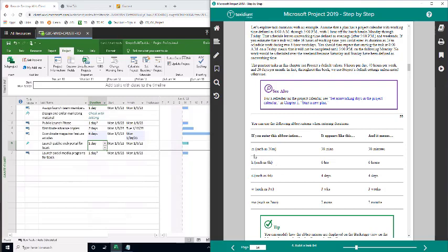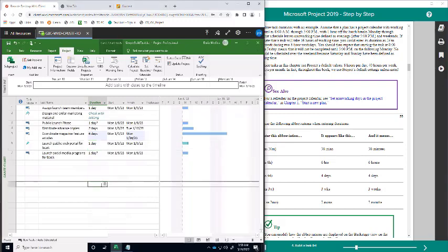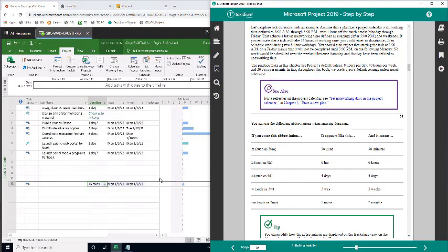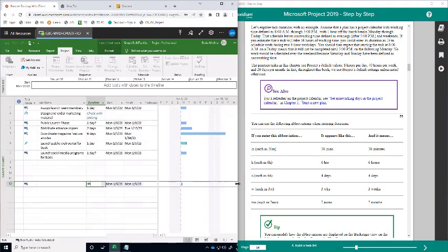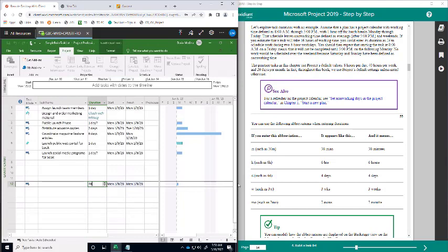Okay, so if you key in M, you'll see minutes, right? And let's do that, right? Let's say I'll say here 45M, and the default for M means minutes, right? But say I don't want minutes, I want hours. Okay, so then let's say 45 hours. The abbreviation would be, in this case, I believe it's H, and so on, 45 hours. And then you can also use days, weeks, or even months.